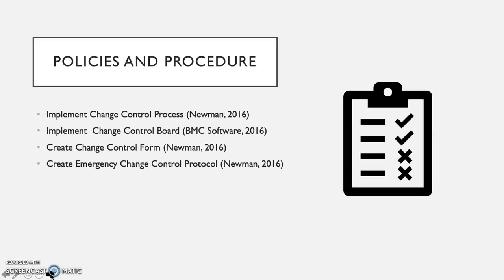What is the need being addressed by the change? What are the systems or processes that are being introduced? Who does the change affect? When will the change go into effect? Has the change been tested previously? And is there a revision plan in place?